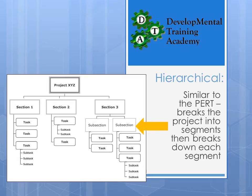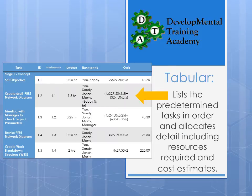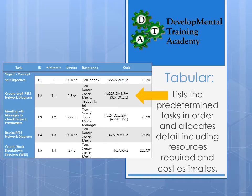However, there's a lot of information missing from the hierarchical format that the tabular work breakdown structure can provide. A tabular structure lists your predetermined tasks — from your PERT chart and so on — in order, and allows you to allocate details to those tasks, including resources such as people, materials, and money, and then generate cost estimates for each particular task. There's a sample you can see there, and we're going to go through each column and each section in detail.